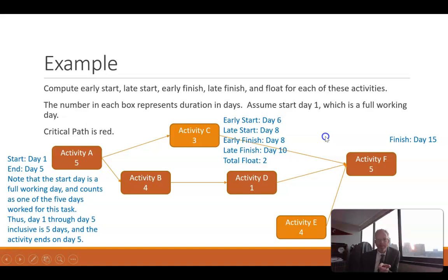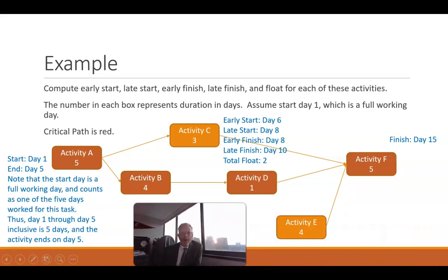See how we did? Early start day 6, late start day 8, early finish day 8, but there again, remember, the end of day 8, not the beginning. Late finish day 10, and total float of 2. Okay, so we were able to compute it there.